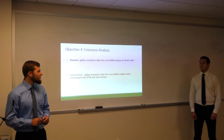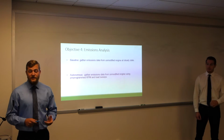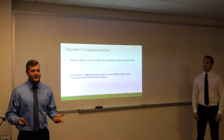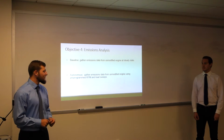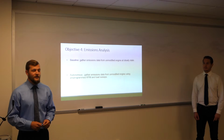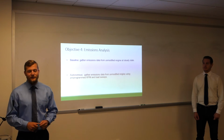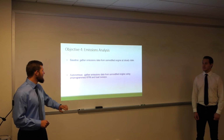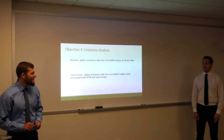And we didn't have a spot to put it until about 3 weeks ago, I'd say. And so we actually hadn't run any of our systems because we couldn't use it unless we had the scooter running, which we couldn't run because we had nowhere to run it. And so we still haven't found a place where we can set up our dyno. Our dyno takes a 220 power plug, and nobody has a 220 power plug. We've been trying to get one wired, but we've been told it'll take 3 to 4 months to get it going. And so we haven't been able to get any emissions analysis because we haven't been able to run our scooter. So that was kind of the source for a lot of